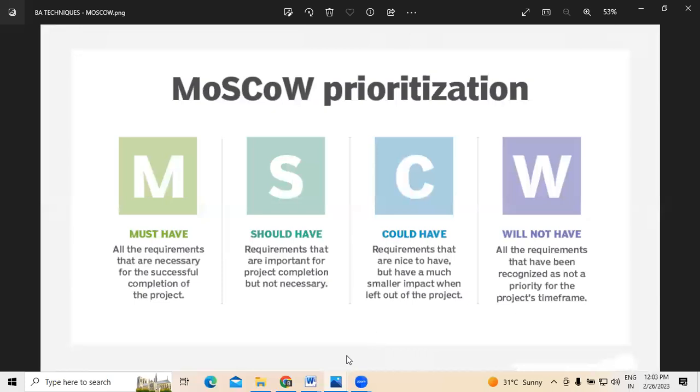Is it clear to everyone? Nanak, Abhishek, Kiran, Janak Raman, Swati. Yes, sir, it is clear. We are using the release methodology. On the basis of the quarter, we take some requirements from the client and then we prioritize them. This will get done in this particular release, and for that also we have a plan. In Agile, we do that.